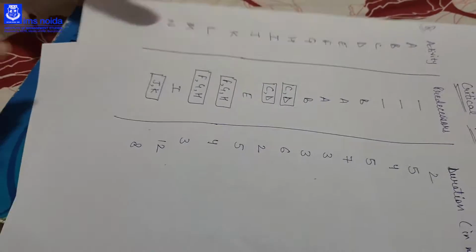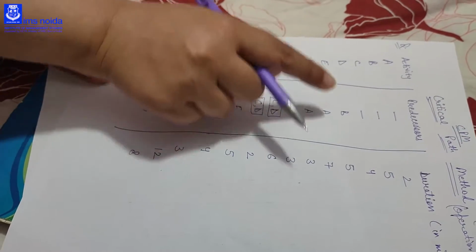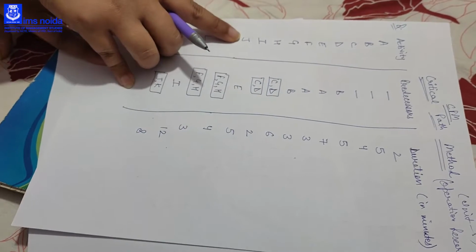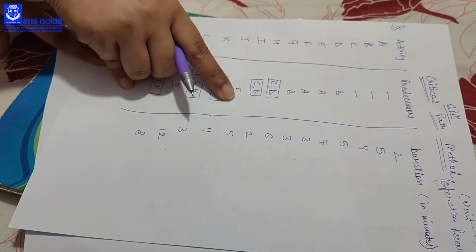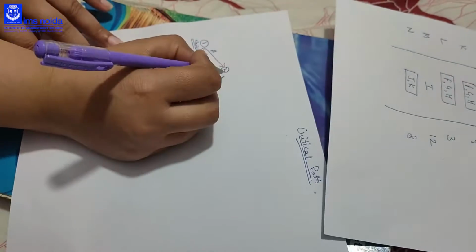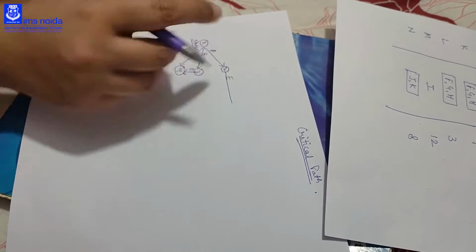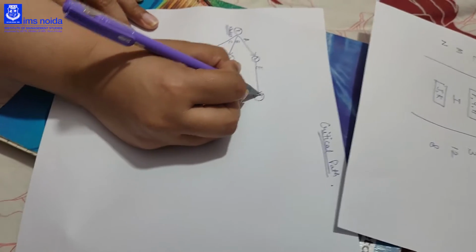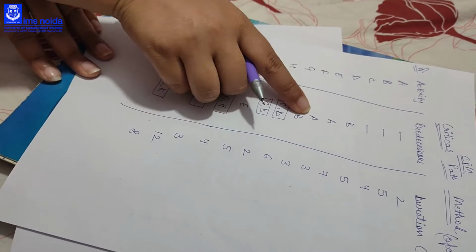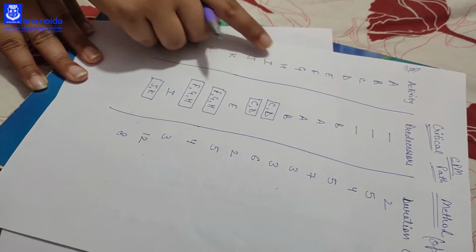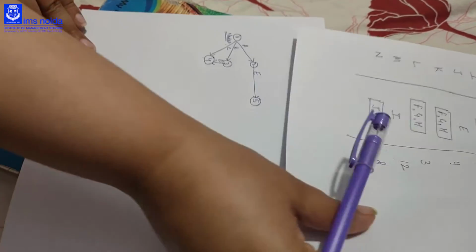Now we will start with activity E. As you can see, E starts with A, and E is required to start J further in the question, but it is single, not combined with anyone. So we can start E from the second node, the node of A, and the node of E will now be 5. Then come to F. F starts with A and is combined with G and H, but G and H will come later. So F is free right now.